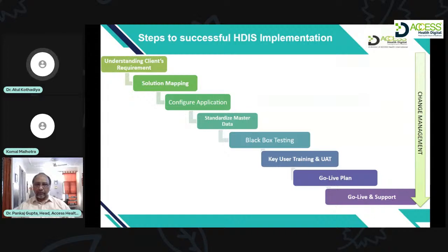Third was the genetics department, because the genetics report turnaround time was 10 to 12 days, so we had enough time in hand. Even if there was an issue, we could fix it within that time span. So we took a phased approach, implementing the LMS software in that biggest lab.